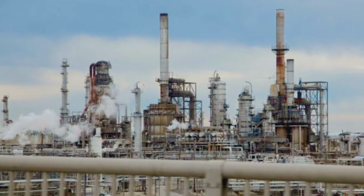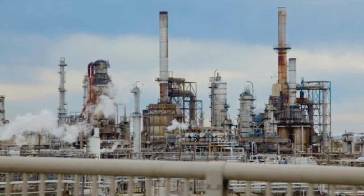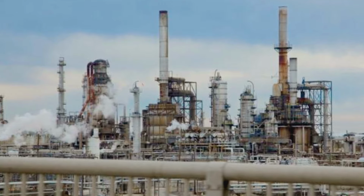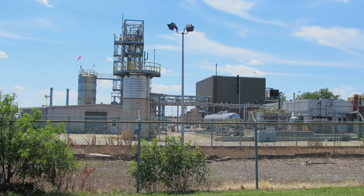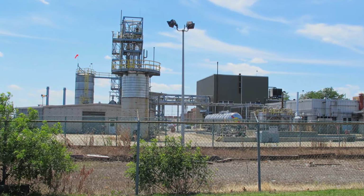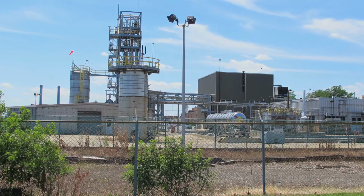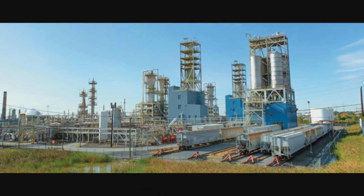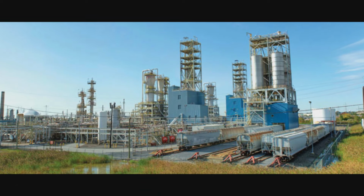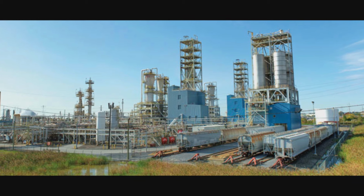The Riggs portion of the work includes installing 12 new 3-phase primary cables interconnecting 2 substations on the property. These 12 cables make up 4 brand new circuits, where each circuit consists of 3 parallel 3-phase cables. These circuits will be used to handle the additional load being put on their power grid. What really makes this project unique and challenging is the fact that Riggs is handling multiple facets of the project and are essentially a full turnkey operation. Both the utility group and electrical group are joint venturing with multiple subcontractors on a very limited time frame to get the power in service.